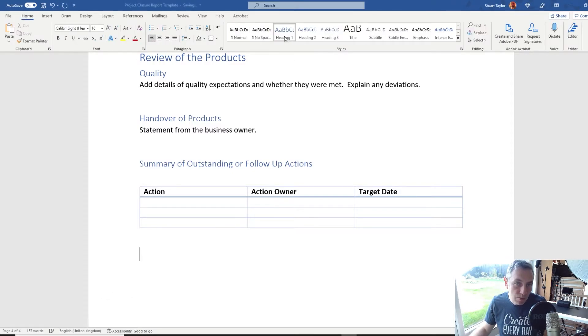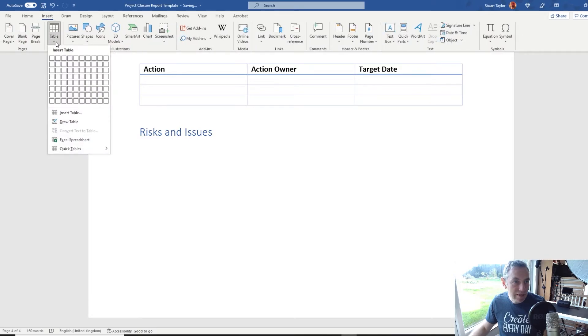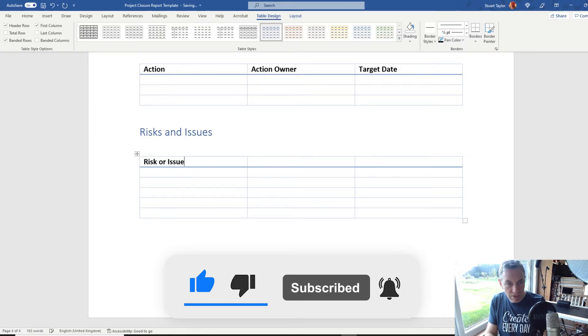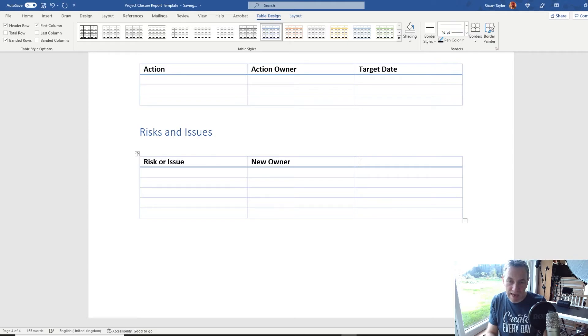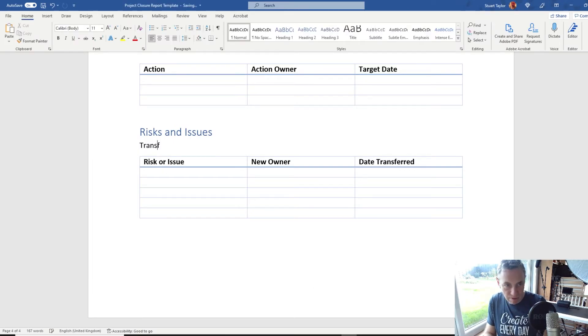Then go to Heading 1 for 'Risks and Issues'. We're going to put a simple table in this section to explain any open risks and issues that have had to be transferred — either because time ran out and they couldn't be completed as part of the project, or because the project itself has created new risks handed across to the business. Insert a table with three columns: Risk or Issue, Owner, and Date Transferred. Don't forget, you don't get to just chuck this over the fence at the new owner — they need to receive it, be the right person for it, and confirm they're going to take care of it going forwards.